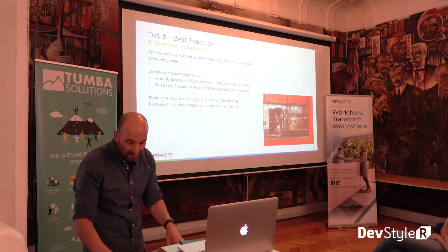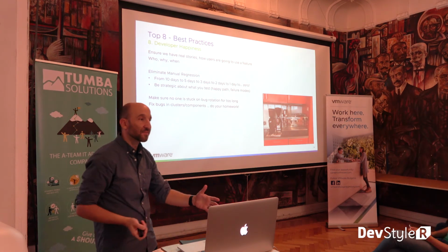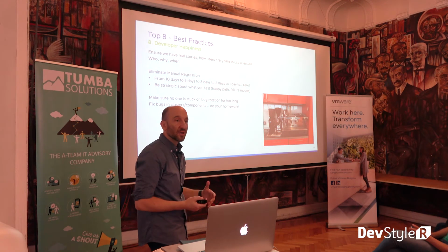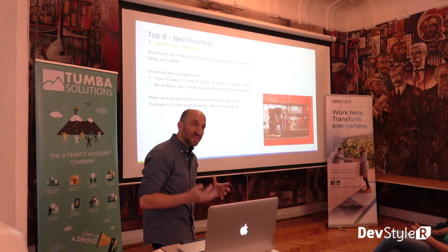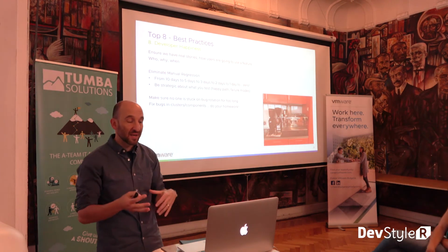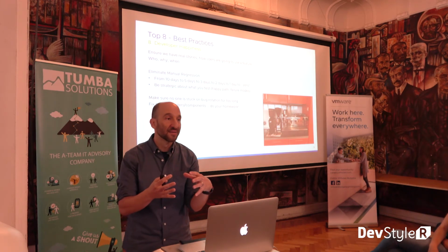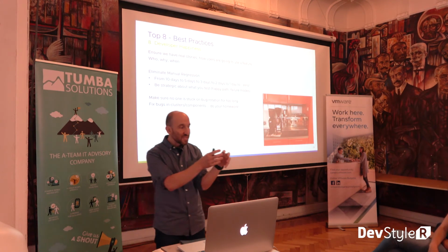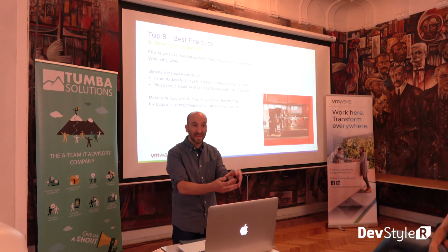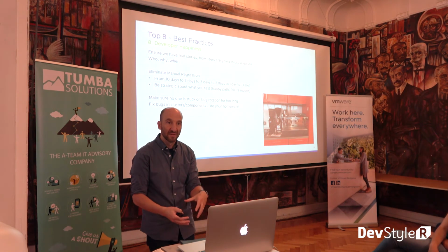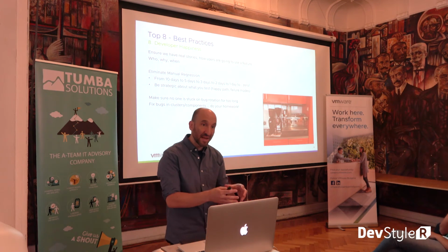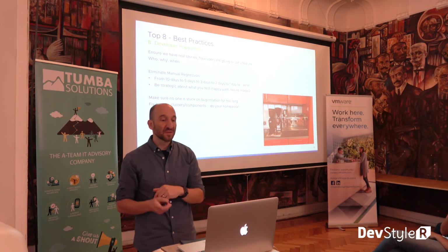And this means if any of you are in charge of your backlog or working with the PM, you've got to do your homework. You've got to look at what's there. And when you say, hey, I need you to fix this bug, it's not this bug, but hey, I have a cluster of bugs in this area. We have a cluster of bugs around this time zone thing that's related to something else. We need to fix them all together, right? And then they feel like they have accomplishment. And then after that, you're onto a feature and someone else is onto a bug.